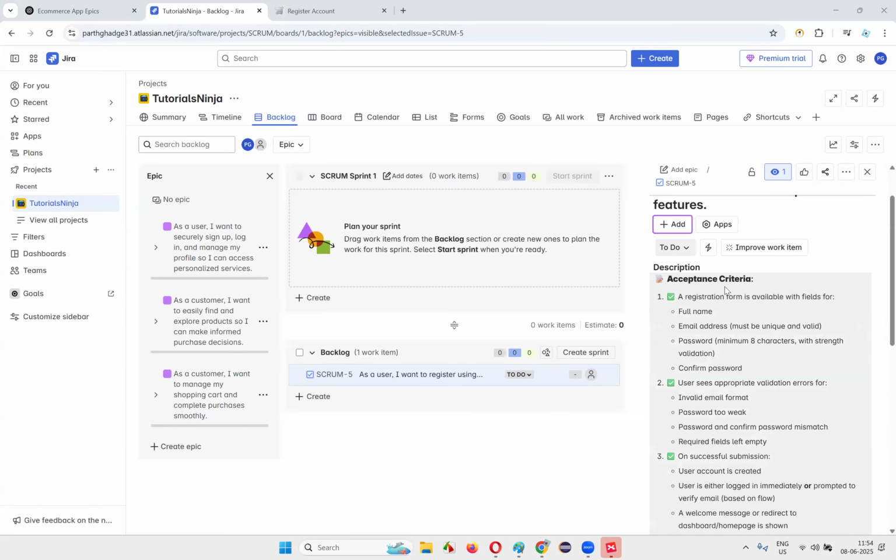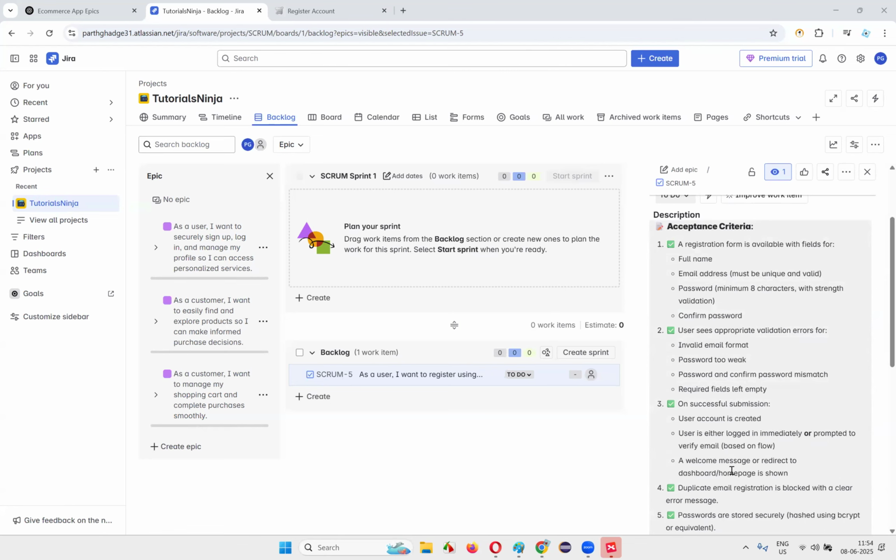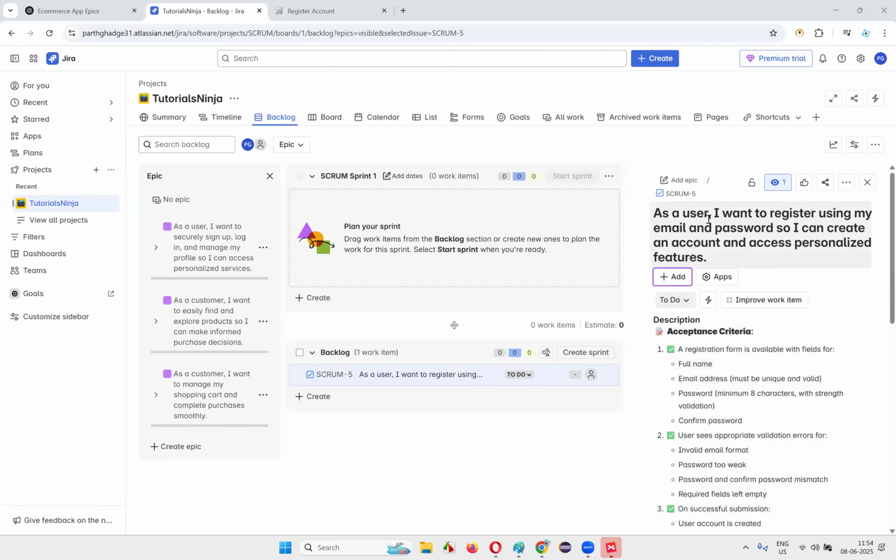Got it, guys? What is the acceptance criteria that the product owner is giving here? The acceptance criteria will contain all the points which developers and testers need to follow and fulfill. Then only the product owner will close the user stories. Though they are marked as completed by developers and testers, the product owner needs to accept them, to close the stories as really completed. The product owner needs to accept the work and be satisfied with the work done by the developers and testers.